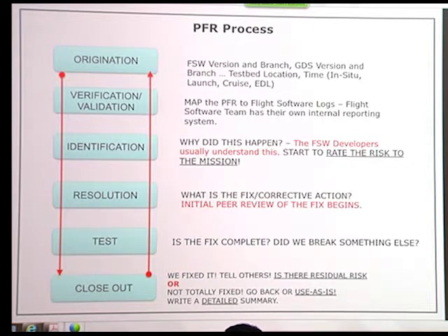If a ground system tool was not used, you want to give the procedure that was used, the procedure version, the procedure number, the test bed location, the time at which the test occurred, and the conditions that the test was stimulating, whether it was an in-situ test, a cruise test, a launch test, or an EDL test. You want to paint as detailed a picture as possible for those who are going to examine this issue.